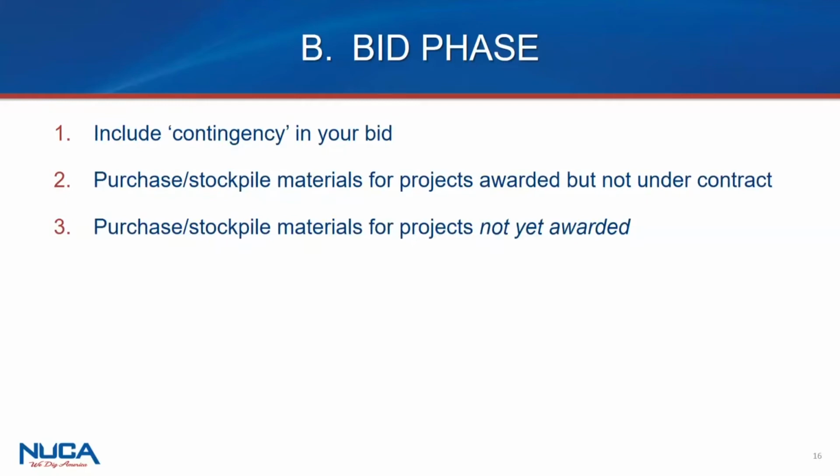if you're full with work, maybe you've got the ability to do that. The effectiveness of this is probably tied, certainly in public work, to the extent that other bidders are approaching it the same way. If they're not, insofar as work is awarded normally on the basis of low bid for public construction, that's certainly going to protect you, but it's also going to keep you from getting the job.